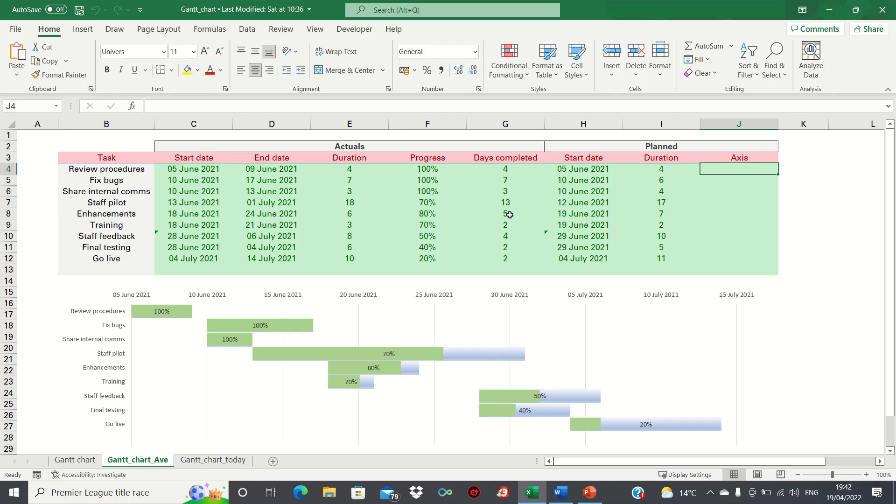However we want to add separate bars to illustrate the planned start dates and durations showing in columns H and I.